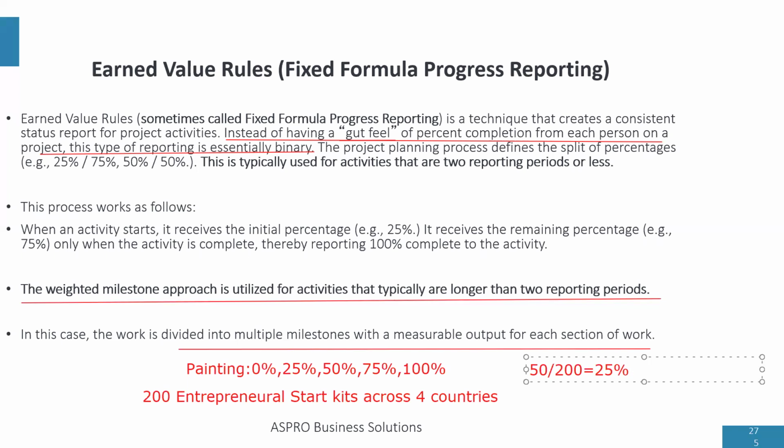Since the deliveries were the goal of the project, and the company that was handling the promotion would give us names every week, the number of names we delivered, I just divided over 200. And when they asked me what the status of the project was, I'd tell them: we're 25% complete.